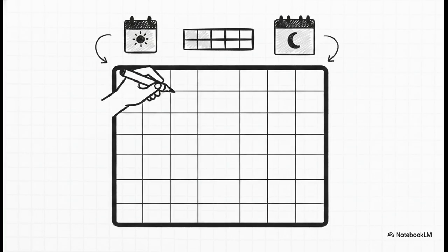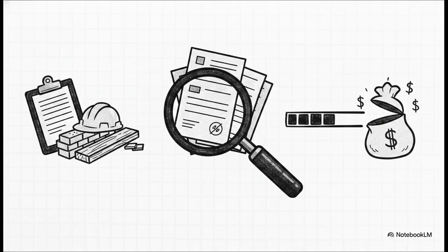Let's zoom in on Step 1. The absolute crucial point here is setting up that initial framework. You have to decide how you're going to allocate expenses by labeling your column headings. Are we talking daily, weekly, monthly, maybe even annually? This entirely depends on the scope of your project, right? A massive commercial high-rise is going to look very, very different from a small residential roof repair that wraps up in a week. With your template locked and loaded, Step 2 is information gathering.